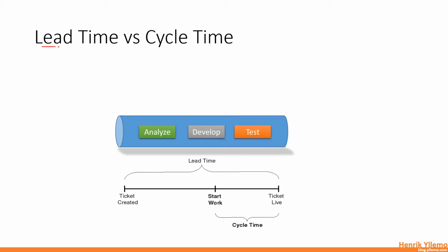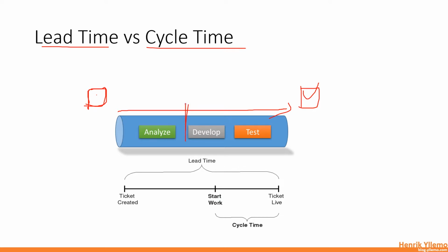There's also a difference between lead time and cycle time. This can be described at the full length here. From the beginning, we have a ticket being stored, maybe in a ticketing system, until it's finished and ready for production. This is the lead time. So the entire time, when you have the entire package from something being created to the end, that's the lead time. The cycle time is more when you start your work until you finish off the work.